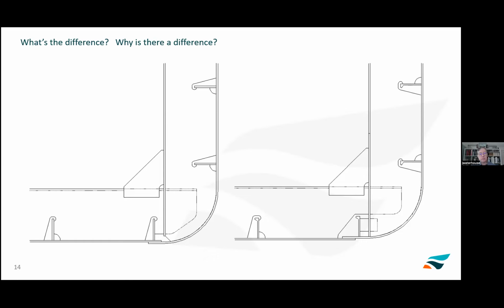You also notice that the bottom seam is different between the two. In one, the flat bottom plate is on top of the rolled section in the corner. And on the other one, the rolled section in the corner is sitting on top of the flat plate. What this reflects is that the build strategy was to build that side piece turned over on its side and then lifted up and rotated 90 degrees into place, so that by creating the lap on the right-hand side, it gave them a spot to rest and align that side module on top of the bottom module to make it easier to hold in place and then weld and support during construction. So be thinking of sequencing as you're putting a kit boat together.